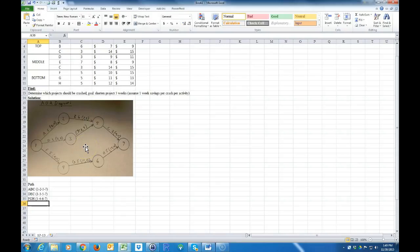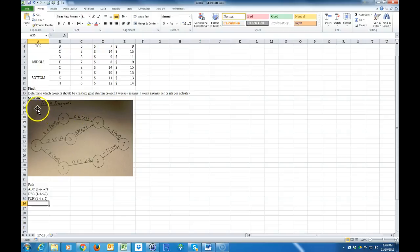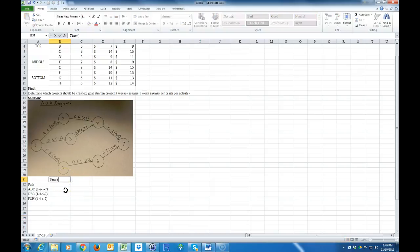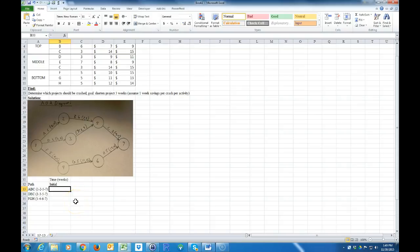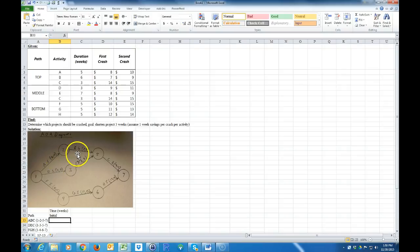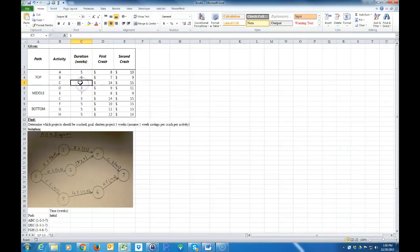An important thing for the template — the nodes must be in ascending order as you go to the right: 1, 2, 3, 4, 5, 6, 7. Now I'm going to put the time in weeks for each path. For the initial time, how many weeks does it take to go through A, B, and C? You have to do activity A first, then B, so that's 5 plus 6 plus 3 — that's 14 weeks.